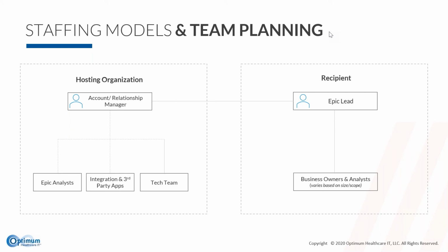Early on, this is also a role that frequently gets wrapped into an existing application manager. It might fall under an ambulatory application manager, for example. I think that is a potential risk where it frequently isn't at the top of that person's list. They might be managing multiple internal rollouts and other initiatives as well. So it becomes one more thing on the list, and it's not the thing you want to get dropped, basically. So I think that's a risk, and it's something I'd encourage you to think about as a dedicated resource, where then your application managers obviously have oversight over the application pieces of it.